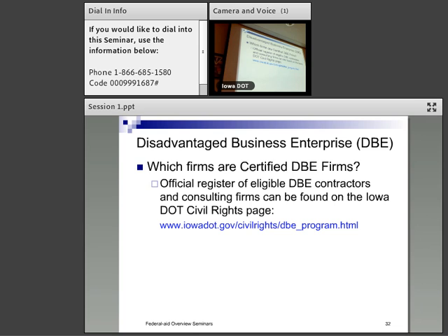If they were not, and there was no change that was made contemporaneously, and that could be a change order. It could be, in some instances, if the DBE was unable to show up on the job site and finish the work that was committed to them. If they had been properly removed, or if there had been a proper contemporaneous reduction in the commitment to the DBE, then it's going to be all right. If there was not, and contemporaneous really is crucial, if there was not a contemporaneous alteration that was made, then there was going to be a price adjustment dollar for dollar in the amount